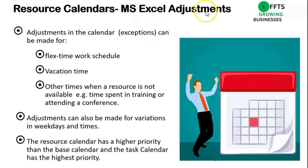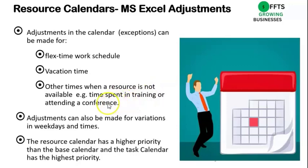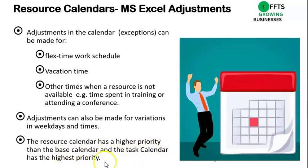In terms of our Excel adjustments, we can adjust for flexi time, vacation leave, and other times when a resource is not available — for example, time spent in training or attending a conference. Adjustments can also be made for variations in work and weekend times. Suppose a person is part-time and only works on Friday and Tuesday — that needs to be reflected in planning and in the resource calendar. The resource calendar has a higher priority than the base calendar, and the task calendar has the highest priority.